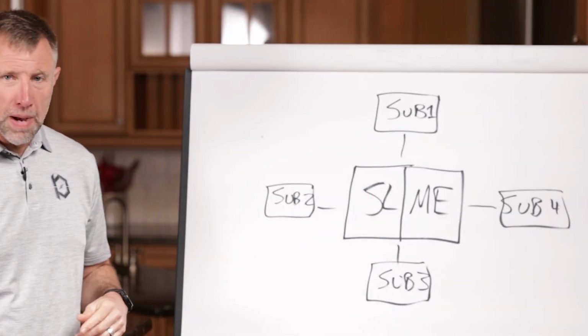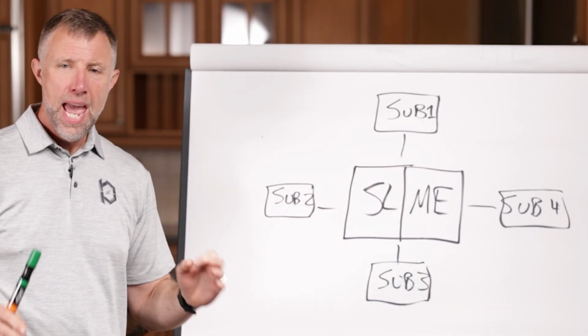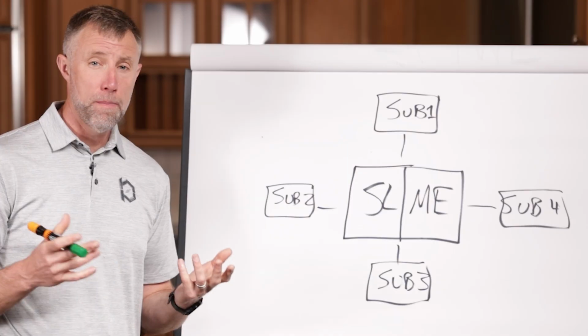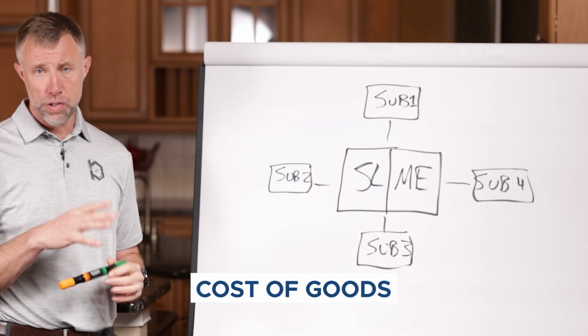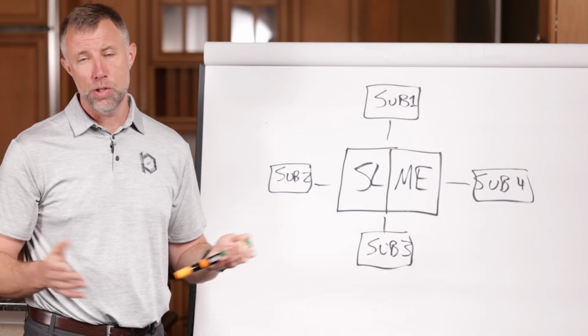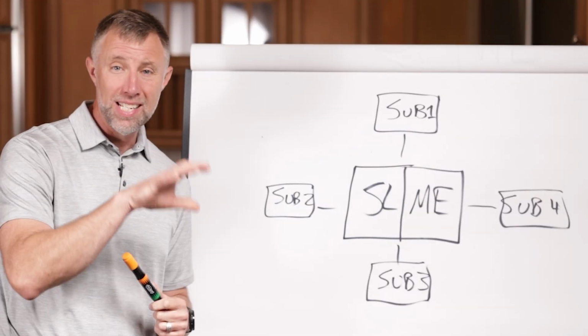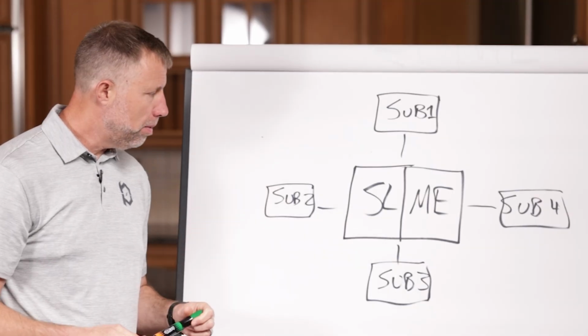So if you look at the diagram, I want you to just see, wait, what if we standardized everything around this? And we need to start with understanding that, as I said before, subcontractors are usually our biggest line item cost in the business overall. If you were to add it all up and look at your cost of goods, it is definitely in a construction business going to be the biggest expense in most cases. But the biggest chunk of that is likely going to be the subcontractors that come in with the installation and including the material and the equipment.